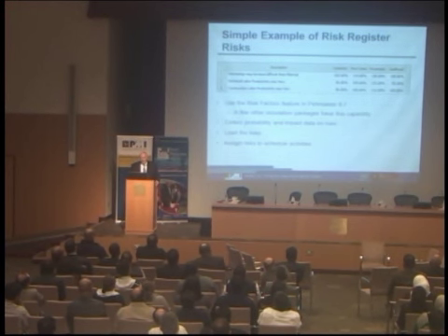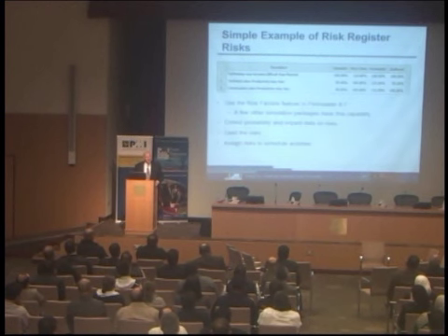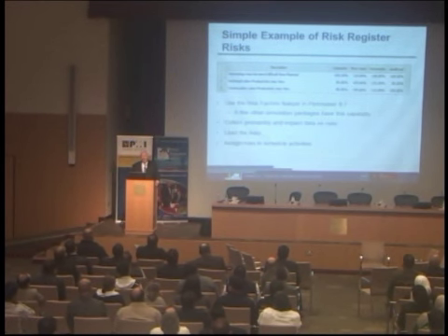The most likely is 10% more, and the pessimistic is 30% more than that, and it makes a triangular distribution, and for every iteration, it will choose from that triangular distribution the multiplicative factor that is applied to all activities that risk is assigned to. This one happens to be 100% likelihood because somebody said, it's happening now. And you say, wait a minute, David.